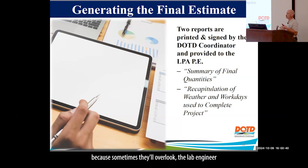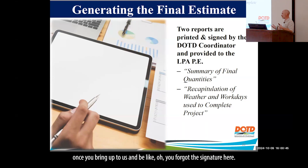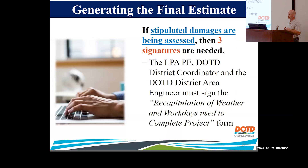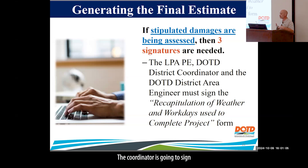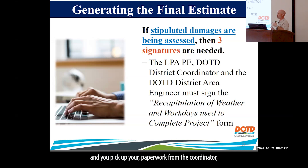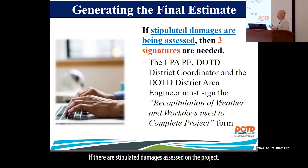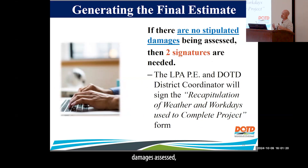Sometimes the lab engineer will overlook the signature page and forget to sign, and then you have to go back to the lab, get it signed, and resubmit. If stipulated damages are assessed on your recap of weather and workdays, you're going to need three signatures: you sign it, the LPE signs it, the coordinator signs it, and the district area engineer signs it. If there are no damages assessed, you only need two signatures — you and the coordinator.